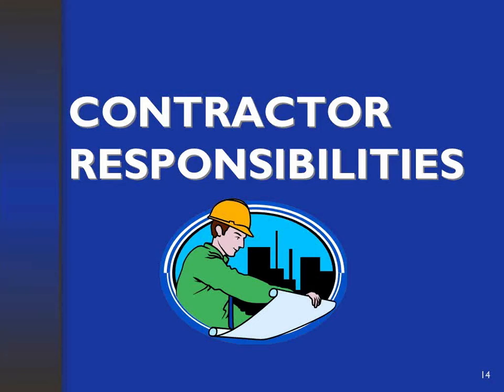So you might want to do it in terms of phasing, where you do it at 20% or 25% of the project, whoever's on that project at that time, another 50%, 75% as the project moves along on the construction schedule. Or if it's, for example, a substantial rehabilitation where